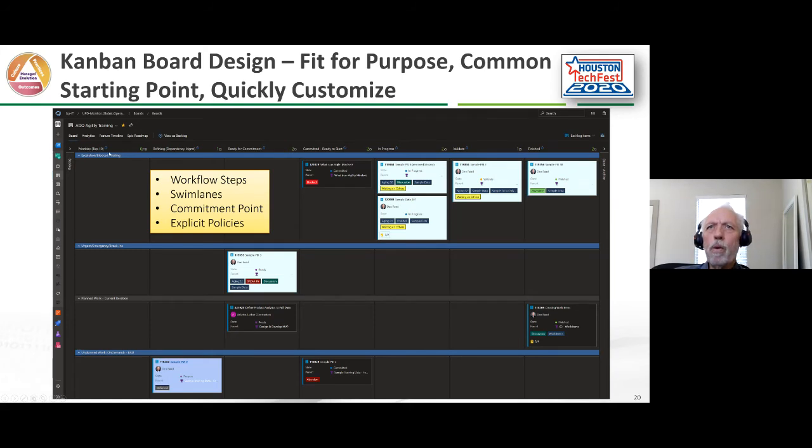You can see that we have columns across the top, and this may be pretty small to some of you. But the way this works is we have a backlog, could be 1,000 things here. We have a column for prioritization. So a product owner or delivery, a demand manager would prioritize these top things in here. Could be top 3, top 10, but he's pulling things out of the backlog and refining them. And we have a refining step here where we're actually trying to resolve dependencies as well as make sure we've documented acceptance criteria and done the work breakdown structure appropriately.